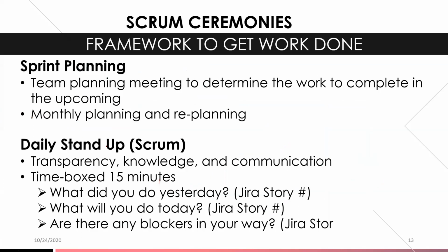And the daily stand-up. What does the daily stand-up provide? It provides transparency, knowledge, and communication. So basically, each team member knows what the others are doing within the stand-up. The daily stand-up is time-boxed for 15 minutes, and each team member provides what they did yesterday. And of course, I reference Jira because that's the tool I've been using. What the team members are going to work on today, and if there are any blockers.